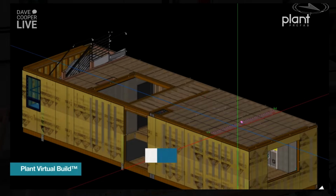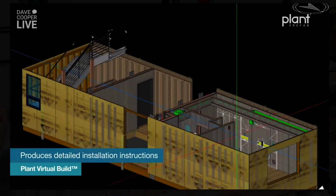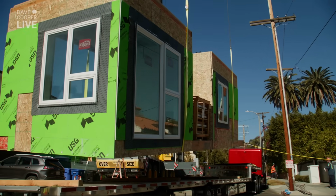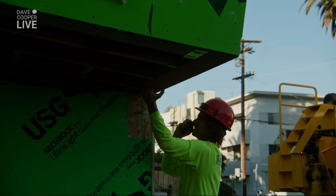Got it. So your job begins and ends pretty much here in the factory, and then when it's all set and stacked on site, walk me through how far do you go? And then when is it turned over to the general contractor? So we're FOB. Got it. They're responsible for transport, install. So typically they're going to work with, there's some pros in here. Right. Mod set, pro set, mod built. All folks industry veterans, yeah. Folks who know what they're doing. We recommend them to the GCs.